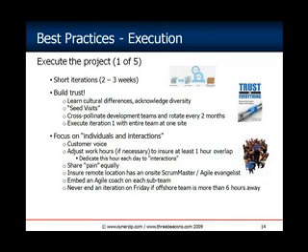Plan and budget some seed visits where key project members visit the remote site and vice versa, or better yet, both visit each site. Cross-pollination means take a couple of your local team members and plug them into the remote team for a couple of months. And return the favor. Take a couple of your remote team members and plug them into your local team for a couple of months.